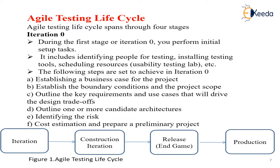What are the steps to achieve in Iteration 0? The first is establishing a business case for the project - identifying what the needs are. Then boundary conditions and the project scope: what are the boundaries, what are the limitations, and what the project can do, how and when. Then outline the main or vital requirements and use cases that will drive the design. Outline one or more candidate architectures, and identify the risk factors.